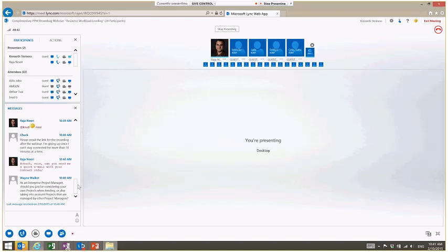Typically, a project manager has been given an allocation of a resource's time. We usually put it in the project management plan, the Word document, that I need these 3 testers for 50% of their time for the month of July, for example. So if you've done that, then the resource leveling activity is all about managing to the allocation that you have been given. And so it's not really your job to worry about over-allocations caused by other projects if other PMs are not doing their jobs. That's usually what the resource manager is supposed to do.